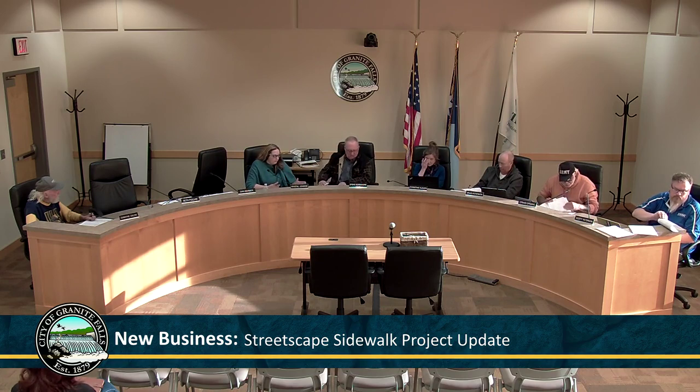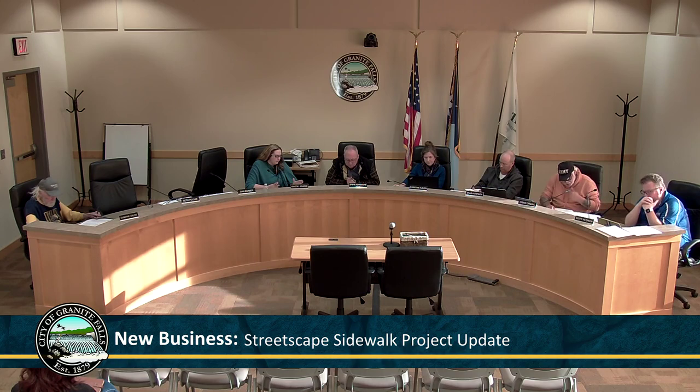So what does that look like? For the sidewalk portion, we did get the cost of that. Again, BG Omnison got that, $399,558. We approved the additional expansion in terms of the scope of work for an additional $30,412, for a total of $429,970.